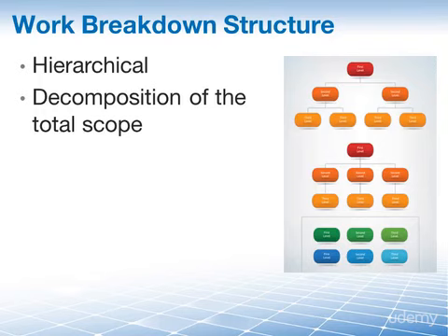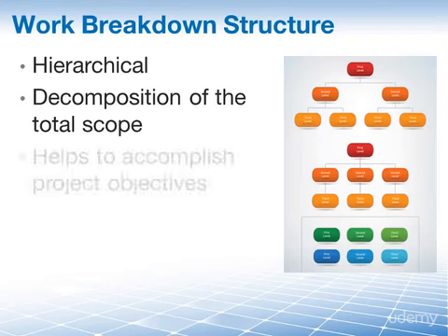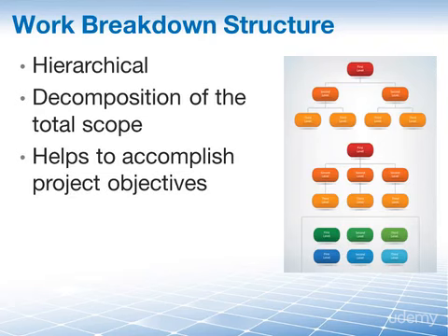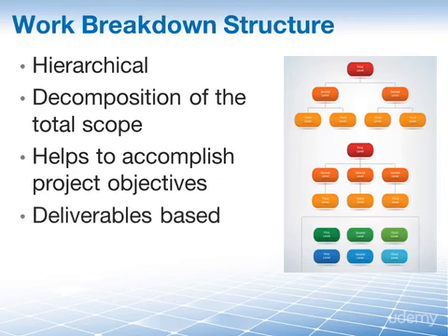The total scope of work is in there, so include the entire scope of work when you are creating your WBS. Doing this will help you accomplish your project objectives since you are including everything in the WBS. And here's another important fact to remember. The definition clearly states that the components listed in the work breakdown structure are deliverables. They are not the scope, they are not the activities, they are not products, they are deliverables of our project.